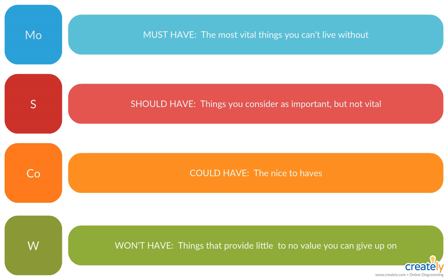sometimes a product owner will have some other stakeholder even come in with a new idea, something that really would improve something that we're trying to deliver. But when they look at that at a detailed level and they think about, well, what will that mean in terms of trade-offs of other things? If I want to stick within my current budget, maybe I can't do that unless I'm willing to pull something else out. And it really requires them to make those kind of value decisions at a very detailed level.